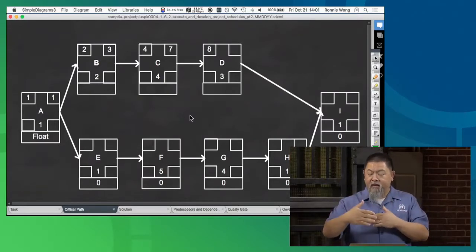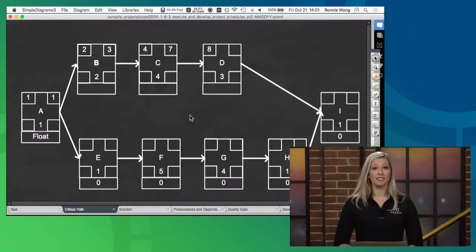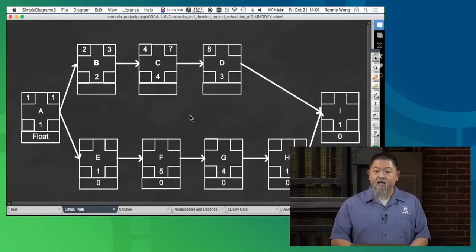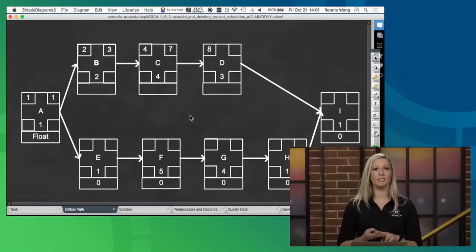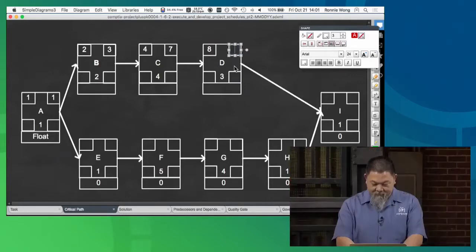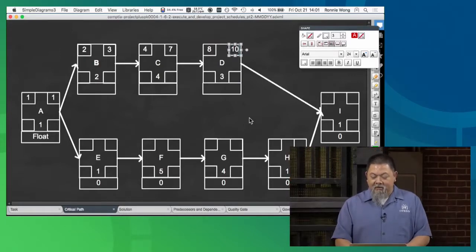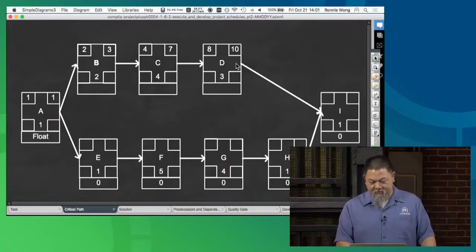Now, if we begin at the beginning of day 8, right, Cherokee? Have I done any work so far? Not yet. So that means that if it's a 3-day task, I have all of day 8, starting January 8th, the 9th, and then the 10th. That should be my EF, my finish, on the 10th. So on the 10th here, that's what we should end up seeing. At least I think that that's right, okay? So there is that idea where we actually do finish that way.